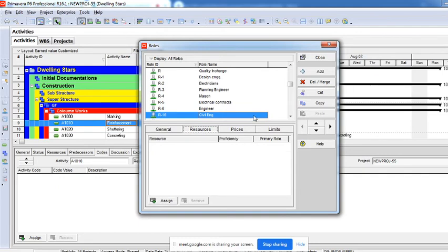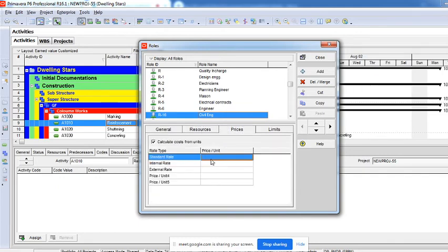Right here I can give the prices: standard rate, internal, external, unit 4, unit 5. Standard is the default price which we give on a per day basis. Internal rate is for when incentives have to be provided to anybody. External is allowances which you give for traveling, for an outsider, for anywhere.